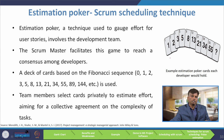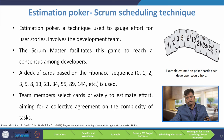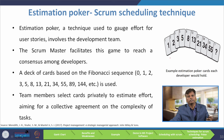Estimation poker is a technique used to gauge effort for user stories and involves the development team. The Scrum master facilitates this game to reach consensus among the developers. Each developer provides an estimate of how much effort is required to complete the task, and if there are differences, they arrive at a consensus. A deck of cards based on the Fibonacci series — 0, 1, 2, 3, 5, 8, and so on — is used; team members select cards privately to estimate effort, aiming for collective agreement on complexity.